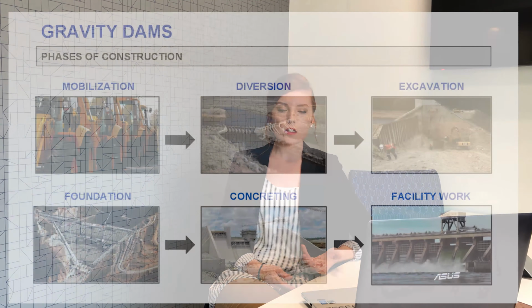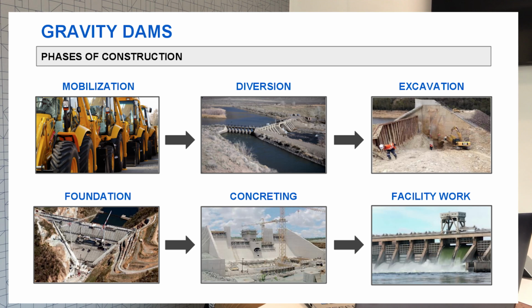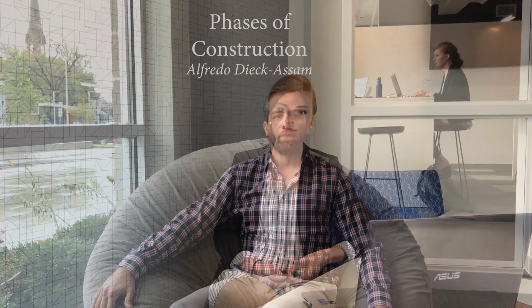The construction process is relatively simple, starting with water diversion, excavation and pouring of foundations, and concreting the dam itself, creating a dam that could last upwards of 100 years.